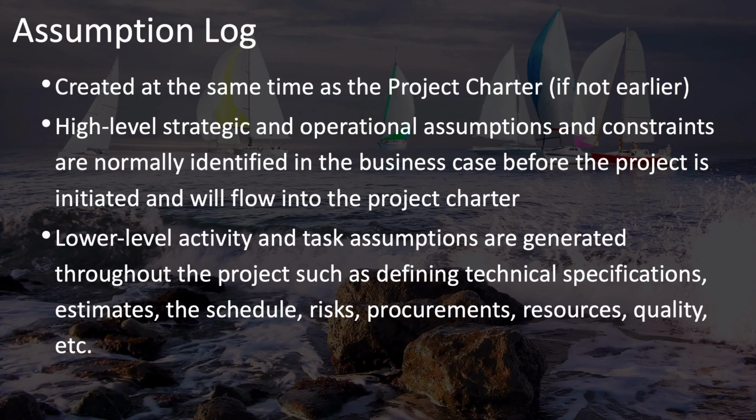One is that you may assume that the quality of the data in the database is good, and it may or may not be. You may assume that the system interfaces will work. I was on a project not too long ago in which this assumption turned out not to be true, and it required extra time and effort for us to get those system interfaces working. Another assumption might be that personnel will be available when you need them, that key stakeholders in charge of participating in the design will be able to make timely decisions and provide meaningful feedback. This may or may not be a valid assumption.